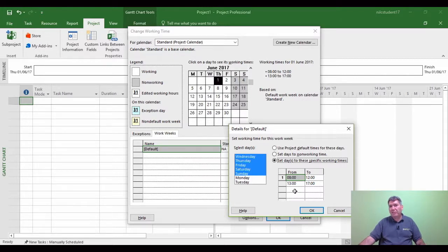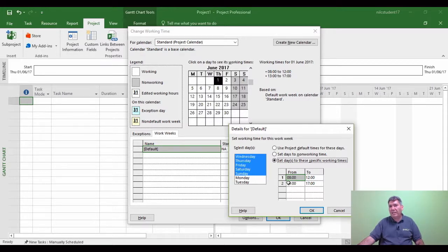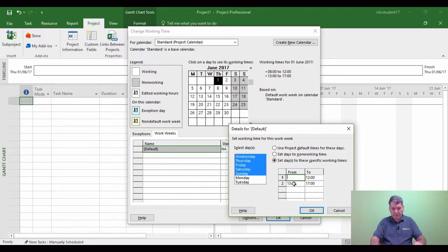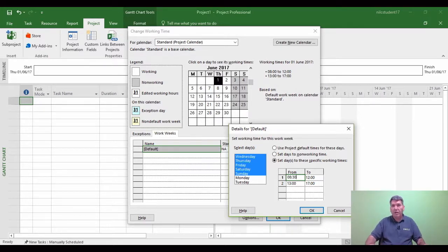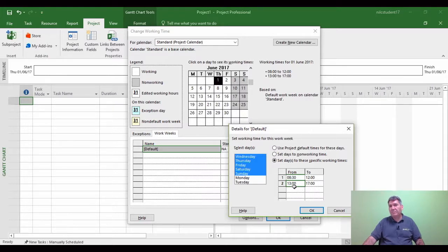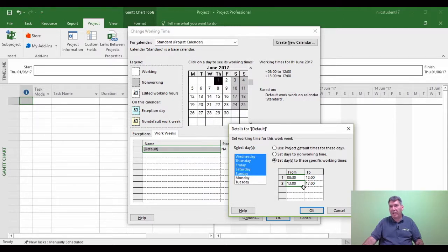And I'm now going to say, okay, I'm now going to set it to the 7.5 hour working day that I set when I customized this. So we're going to say that in this example, that this particular company is going to start half an hour later. So 8 o'clock is going to be 8.30. So I'm going to just type in 08 full colon 30. So the morning session gives me 8.30 to 12, that's 3.5 hours. The afternoon session is now 1 to 5, that's 4 hours. And that's where my 7.5 hours is now coming from. So I've now aligned my calendar to be the same as my customization area. So they're both now fully aligned.